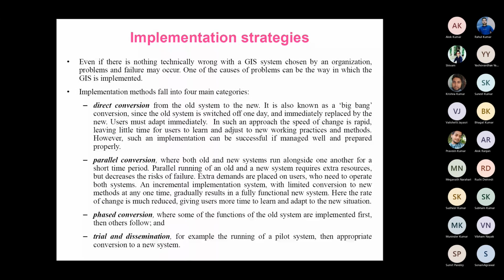there will be redundancy because whenever you are doing any update, it needs to be done in two places. It will involve the cost of two systems because you need to run two different systems together. So it will take a lot of money; a lot of cost is involved in this one. And there is redundancy because whenever there is a duplication of effort, there will be redundancy. There is a chance that the new system gets updated, and the old system will give you the old information. In that case, there will be a conflict.